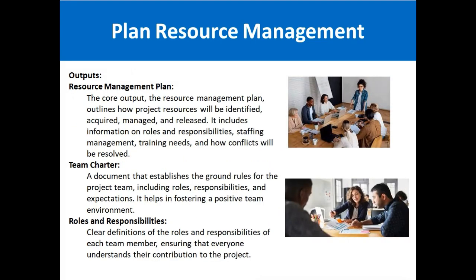The output of this whole process is the resource management plan. The resource management plan basically outlines how project resources will be identified, from where we will acquire them, how we will manage them, and how we will release them once the project is finished.